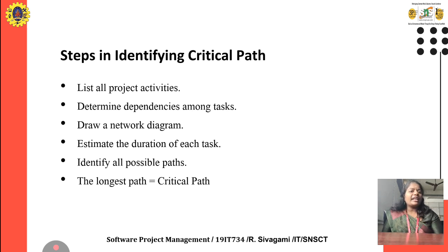And then identify all the possible paths: what are all the paths by which we can complete the task within the timeline. And then the longest path. What is the longest path? The longest path is equal to the critical path. Correct, the longest path is the critical path.